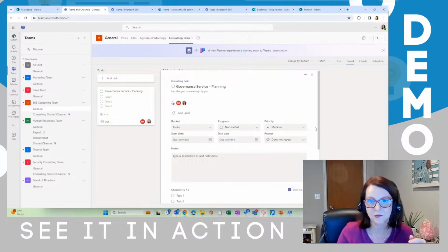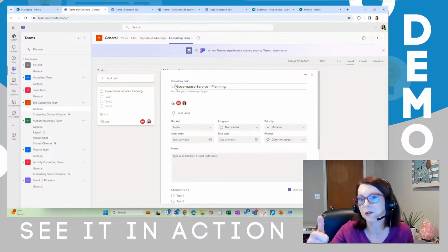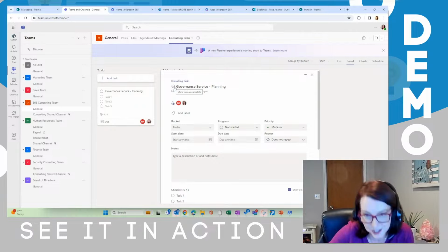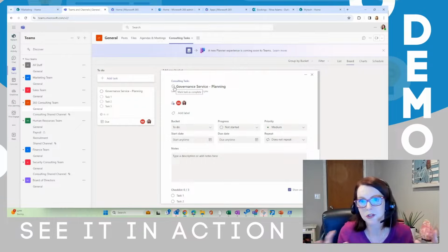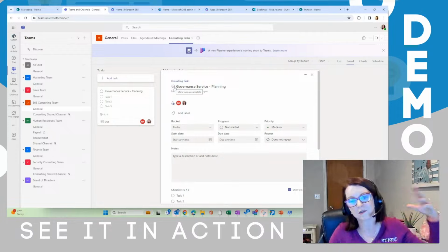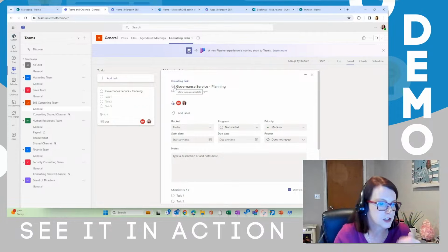I would say, what's one thing that we've run into with class, see if Nate, you're smiling. I would be careful about assigning too many people to one task. What so often happens is I'm done with my piece of it, and then I hit, yep, I'm done, it's complete, and then it completes it for everybody else that's been working on the task, and they may or may not actually be finished with it. So, right, if there's a substantial amount of team members working on it, I would really recommend just breaking up that task into various tasks instead of trying to combine that all into one. So that's just one sort of little issue that we've run into.